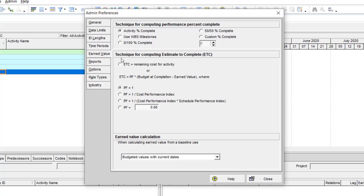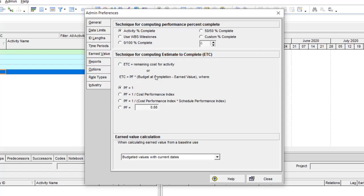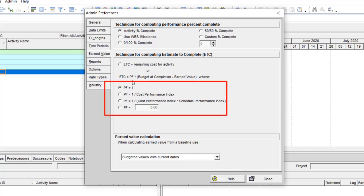First of all we need to understand the technique for computing Estimate to Complete, or ETC, in Primavera P6. ETC can be based on remaining cost for an activity, or calculated by a formula. In that formula you have a performance factor PF. Let me give you some description about the performance factor. We have four ways to calculate using this formula.